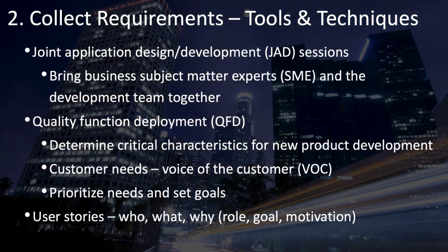Here are a few more examples of facilitated workshops that you can use to collect requirements. The Joint Application Design and Development Sessions, or JAD for short, originally come from the software development industry. These sessions bring together business subject matter experts along with the development team to discuss the needs of the stakeholders, to come up with what the requirements should be, and to help improve this software development process.